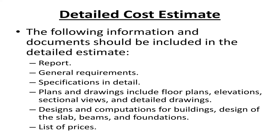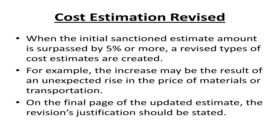Cost estimation revised: When the initial sanctioned estimate amount is surpassed by 5% or more, a revised cost estimate is created. For example, the increase may be the result of an unexpected rise in the price of materials or transportation. On the final page of the updated estimate, the revision's justification should be stated.